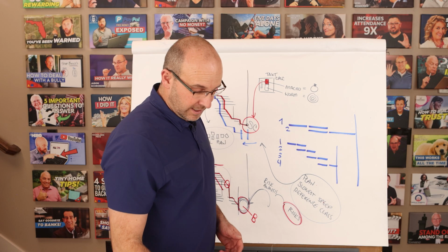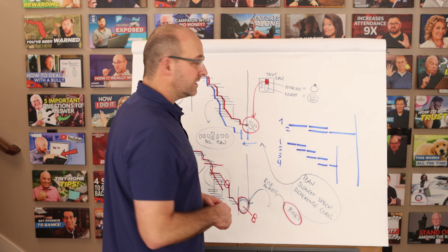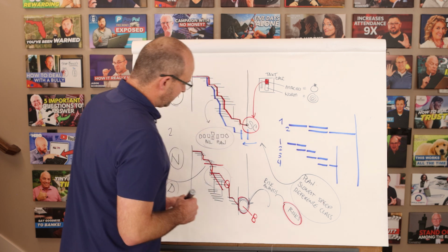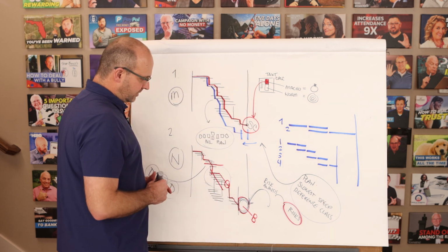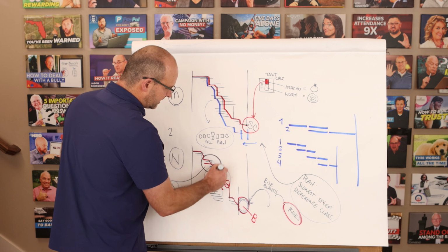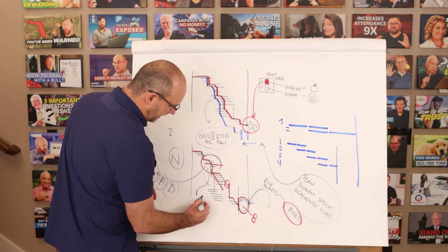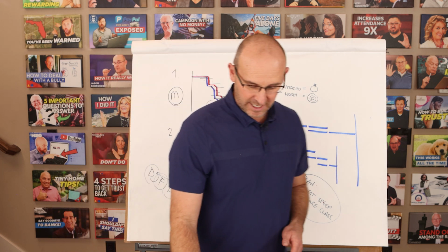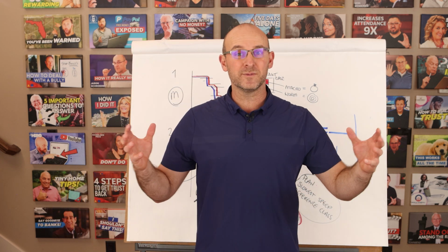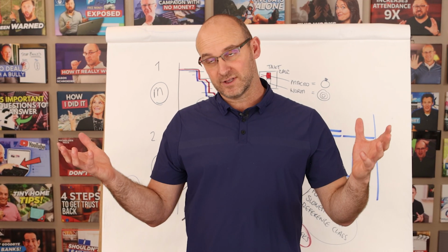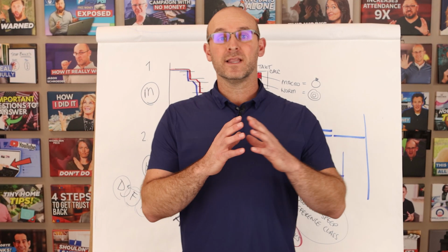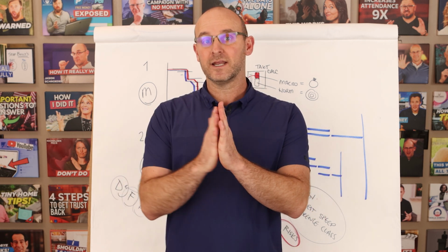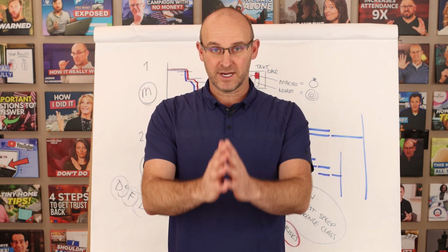Now I'll tell you one other thing that I really liked, and I learned this in the 33 Strategies of War: you have your base plan and you have your plan to execute and go faster. Let's say we're looking at this phase. Every phase must have a plan A, B, C, D, and we have to get ahead of it and make sure that we're always doing pull planning 3 months ahead, pre-construction planning or having the meeting 3 weeks ahead, that we're aligning the supply chain to the activity with buffers, and that we're always doing look ahead and weekly work planning out ahead to find and remove roadblocks.